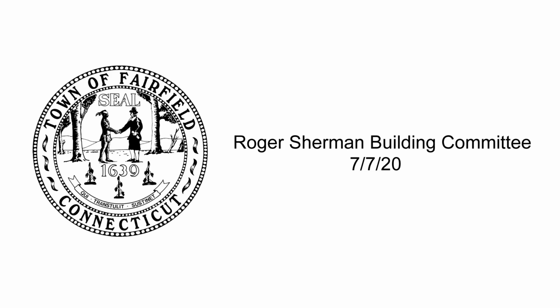That total $7,900. Yeah, one of them, RFI 6, which was the duct run in the APR. That was $5,000, and then they have a PCO for RFI 5, which was to remove the duct above the stage and infill the masonry opening on the exterior wall for that duct. For about $2,900. Okay.